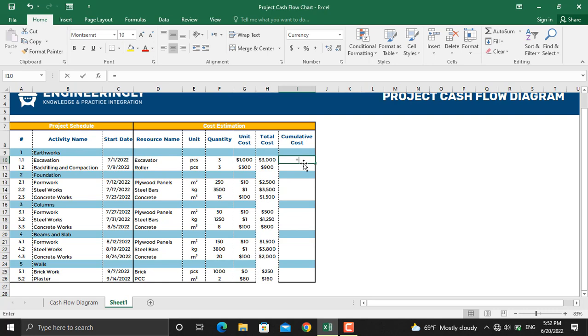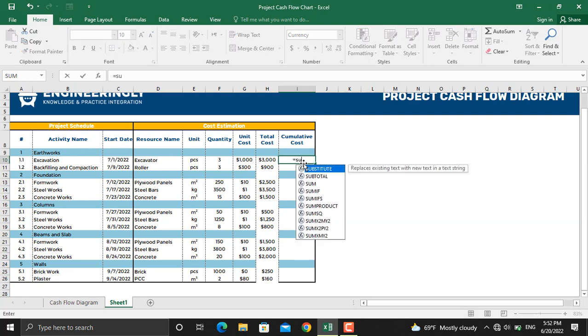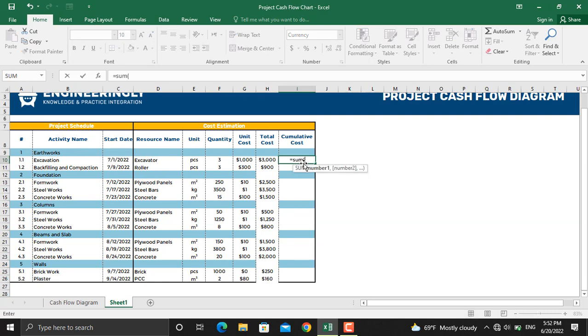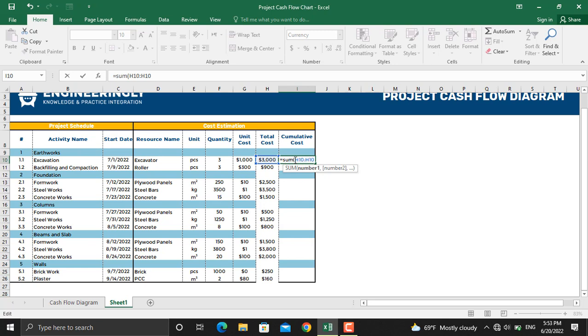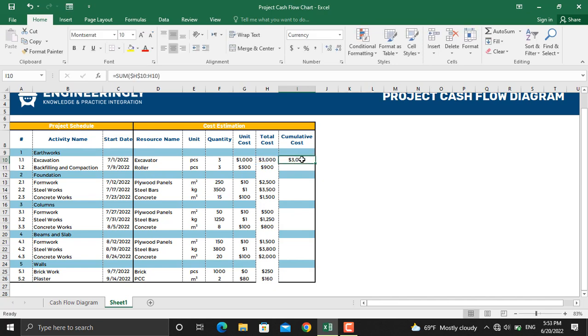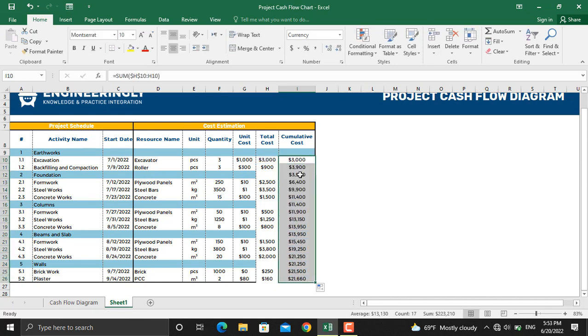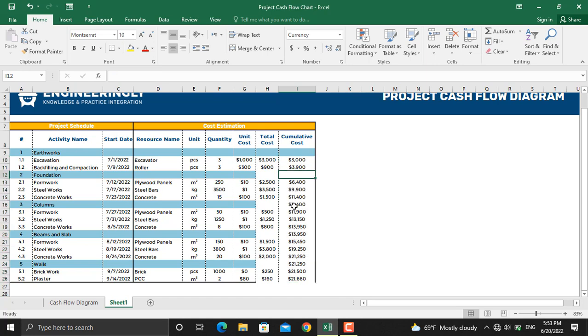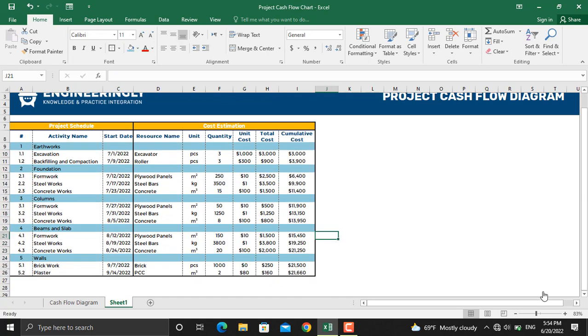For that one I'll write down SUM from this cell up to the cell itself. The only difference is for the first one I lock both the row and the column and I'll close the parenthesis. Next thing is to drag it down. For the work package level I'll remove the values.